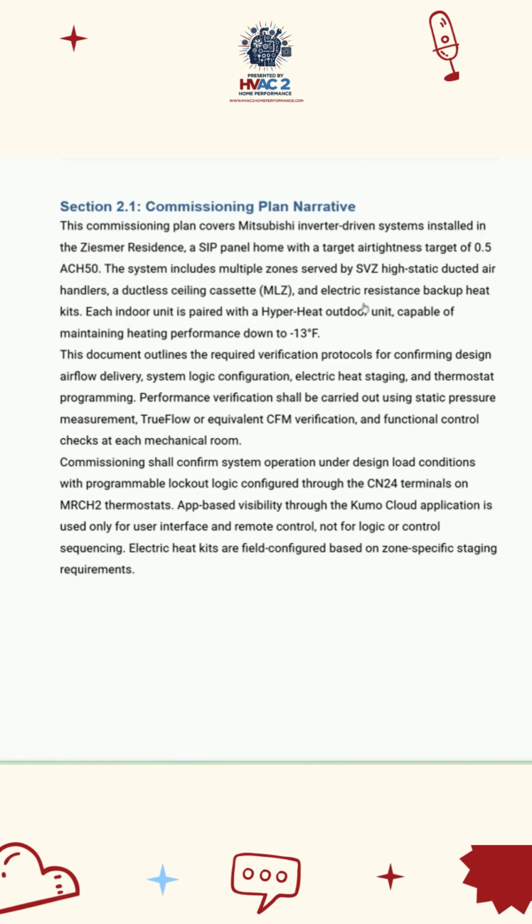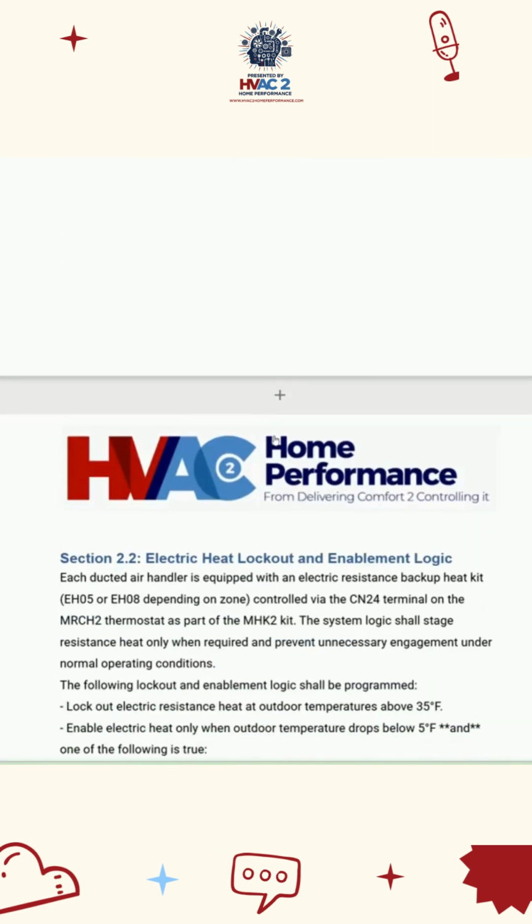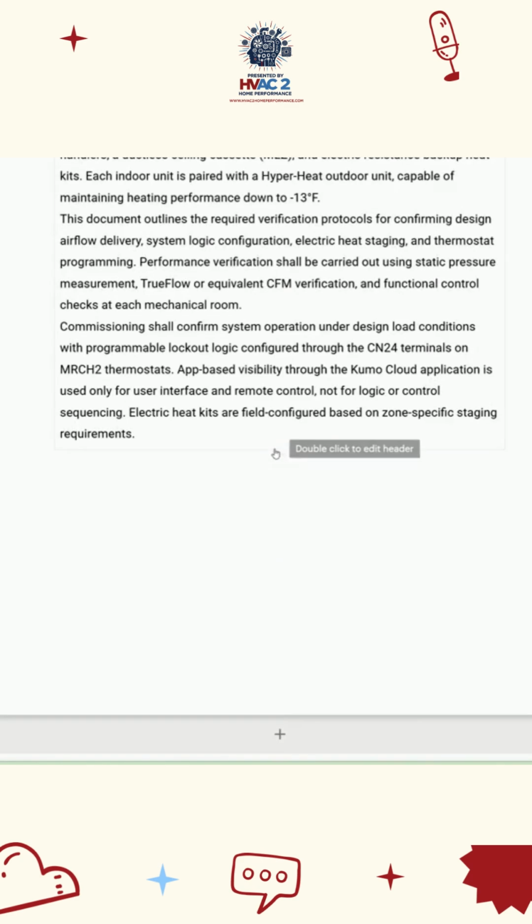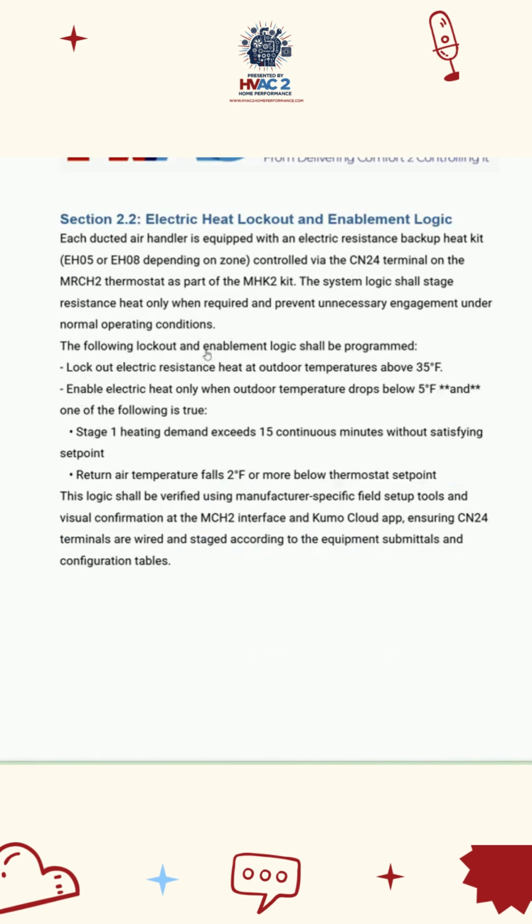We do highly suggest they use the TrueFlow grid and Measure Quick during the commissioning process. We write it into our commissioning protocol. There's no way to make them use that, but we don't stand on the commissioning the same way if we don't have those documents from Measure Quick that are time stamped and dated and tell us that the stuff was done the way that they claim it was done. We really like to see that, and you'll see some of that written into our language here.